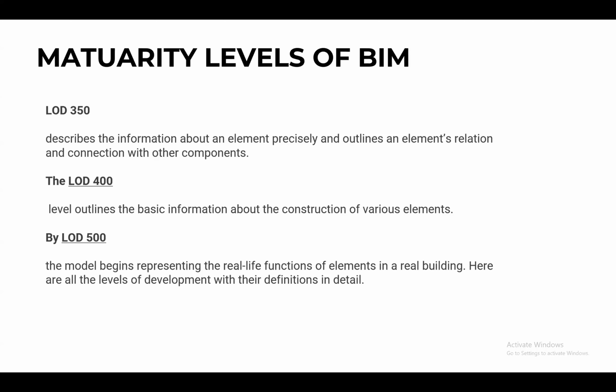Basically, we use Primavera software. But if we use building information modeling, we can create an as-built model, and we can do 4D simulation. So we can connect our construction program with the 3D model. So we can visualize the resources, and it will be easy for our client also. We can easily explain things to our clients by using a 3D model.